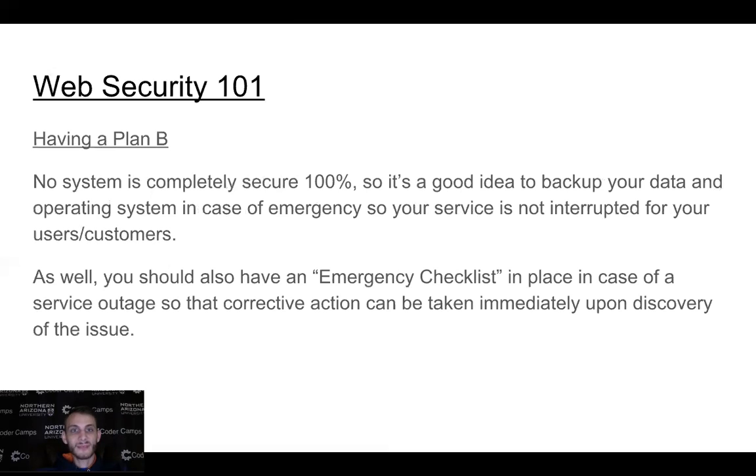Okay, so let's go ahead and let's talk about the emergency checklist. So emergency checklist, just a series of steps to take in the event that the service goes down and maybe you're not around. Okay, so it's nice for teams of developers to have where maybe the project manager's on vacation, but that's okay because they have emergency checklists to take care of whatever they can take care of at that time, and not wait for the project manager to get back, where by then it could be very, very bad. Okay, so make sure you have one of those in place before you start building.